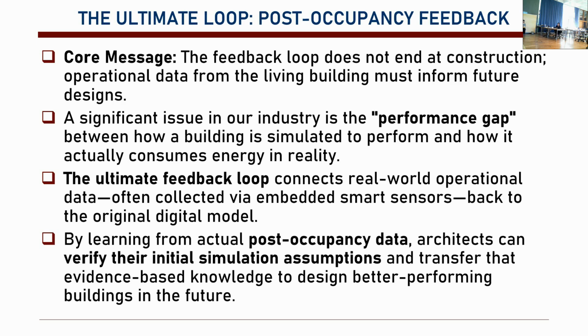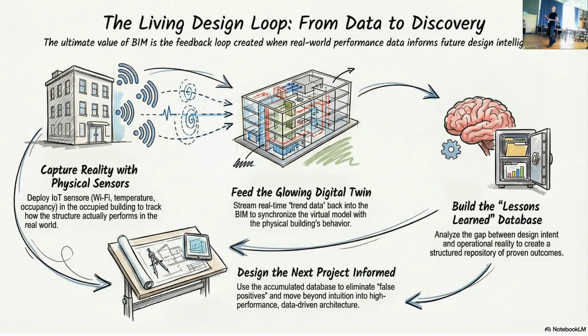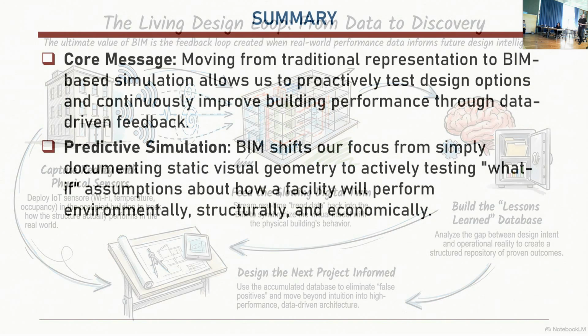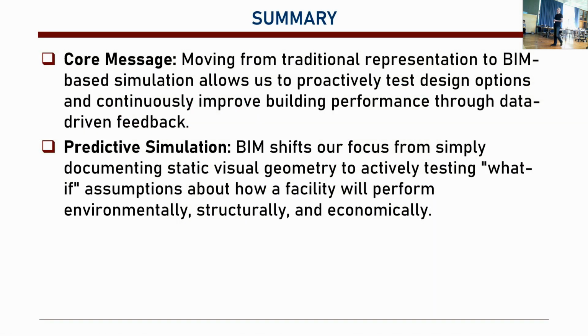And based on that, we can make sure that in future design processes, we do better buildings. Okay? Yeah. So reality can be captured with physical sensors in that regard, and it can be related to the BIM model, and we can test the real life with the digital twin that we already have. This is what we call a lessons learned database. So we will say that, well, this method didn't work, this method performed great, this needs improvement, etc., for our future users.